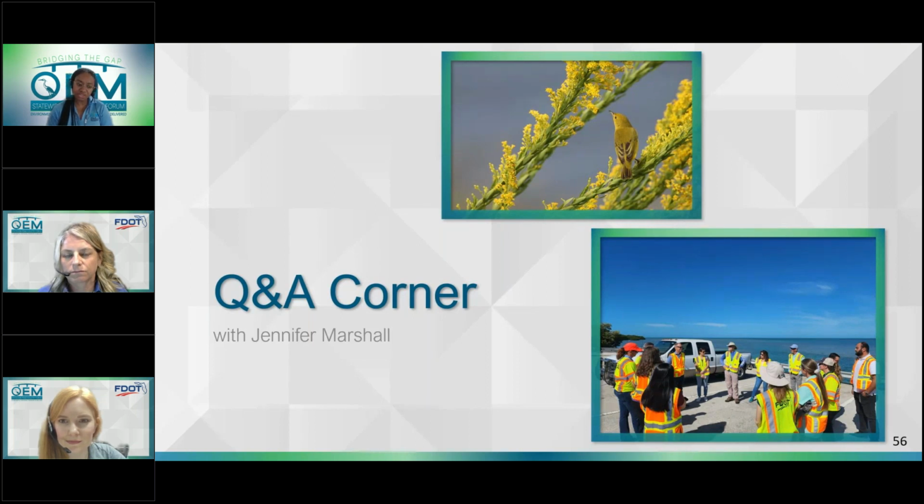The contractor then has about a year of, I'll say, pre-construction activities. And so we actually end up working a lot closer with the contractor themselves in that process, the NEPA folks, which is unusual. And the contractor has to put together work packages, and those work packages go forward with what work they're able to do. I am being super high level about this, but it's a very innovative concept. It really allows our area to get a little more integrated into the results of the project rather than being so far removed as we have been before.